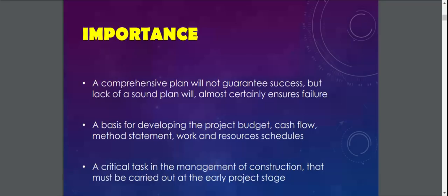So the method actually is very important, because if you do not have a proper method in a construction project, then the chance of failure actually will be very big. But of course, when you have a plan, it doesn't mean that it will guarantee the project's success. Sometimes the project can be delayed as well. And it is a basis for developing the project budget, cash flow, method statement, work and resource schedule. So it acts as a basis for developing the project budget, cash flow and so on.